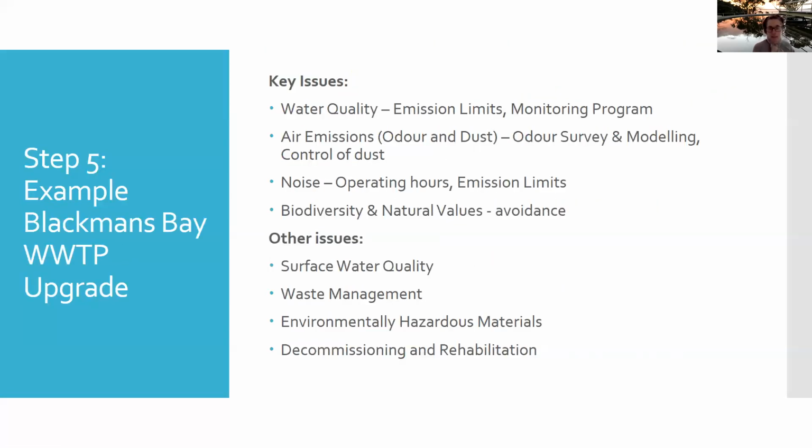I should say back on that one, I know you don't think about it at the time, but decommissioning and rehabilitation actually has to be assessed at the time that you do the development, even if it might not happen for 50, 100 years. Because as I said last week, there's no chance to do it again. There'll be one environmental assessment and then there'll be a regulatory framework.